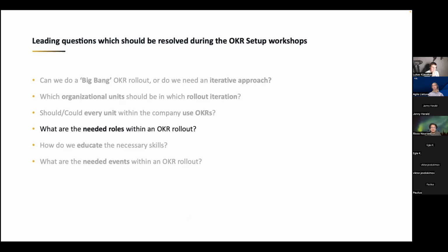Then let me jump, because we're running out of time a little bit, to the needed roles. In my opinion, there are three necessary roles within corporates. I would like to see there an OKR sponsor. In this 20,000-person company, it was the CIO who also brought the topic up, so it was a top-down trigger. And an OKR lead, the one who is really leading the whole program, because it's a lot of effort and a lot of money going into that initiative.